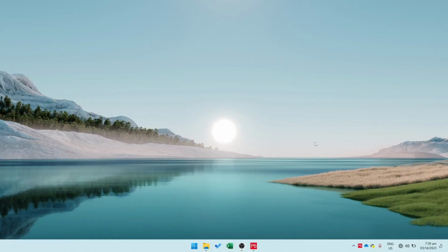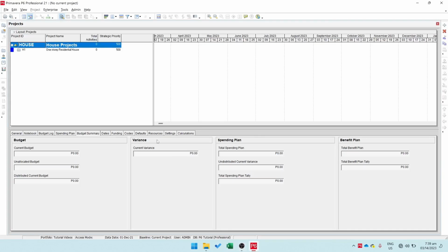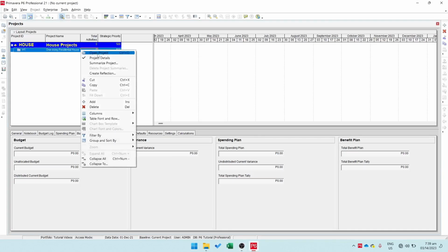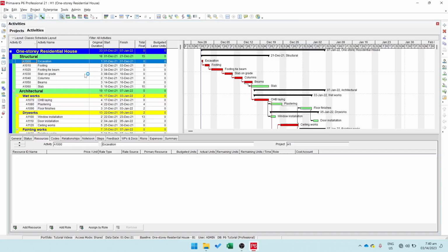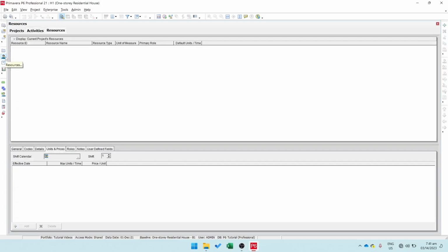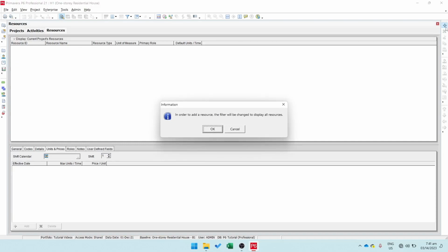So the first thing we need to do is to create resources for your project. If you missed my previous video on how to create project and baseline schedule in Primavera, you can watch it here. To get started, open first your project. Then go to Resources Workspace by clicking this icon. Next, click the Add button near the top right corner of the screen. If you will be asked to filter and display all resources, just click OK.